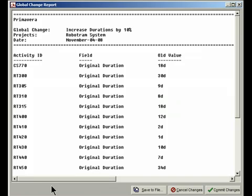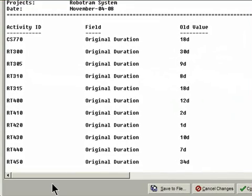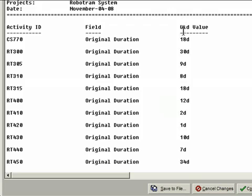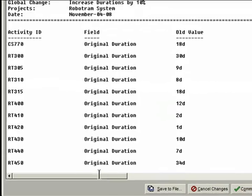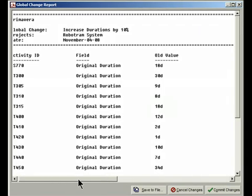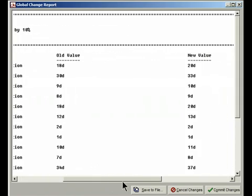Just so you can review them, and you understand what's going to happen before you say yes, do these changes. So here I can see all my activities, and here I can see the old value column. So activity CS770 has got an old value of 18 days. And if I scroll over here to the right, I can see the new values. So 18 days times, or add 10% gives me 20 days.